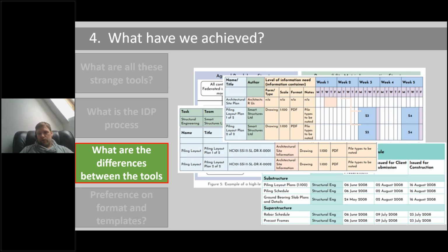But the guidance also tries to tackle some of the common misconceptions that I have personally encountered, and what we've seen on social media and working groups, like the misconception that the assignment matrix is the same as the responsibility matrix. So it does cover that specifically in the guidance. This is where they take that crude tool from the back of ISO 19650 Part 2. They just fill in against clause references and think that that's absolutely satisfactory for assigning the specific granularity of responsibilities on a project, and that's not the case.